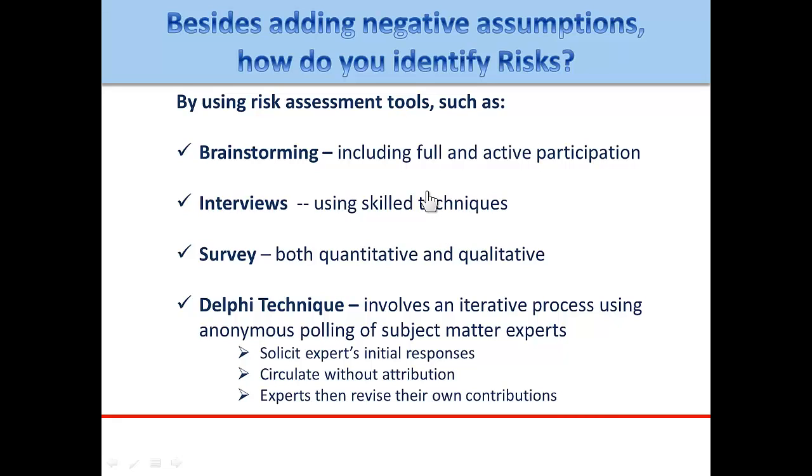Just make sure that you pay attention to including full and active participation, using skilled techniques, and using mixed methods, both qualitative and quantitative. I'll mention three other assessment tools, and there are many, many more that can be used to populate the risk register. The first one that I'll talk about is called the Delphi technique. This involves an iterative process, usually with subject matter experts, or it could be with others who are well informed about the project that's being planned.